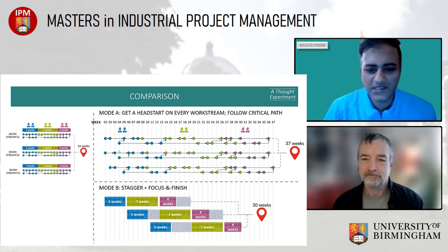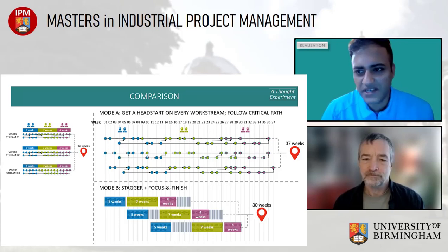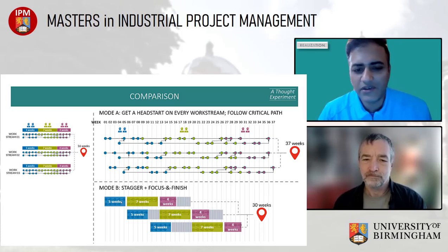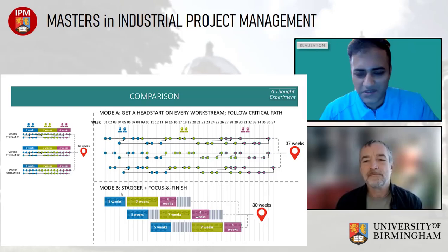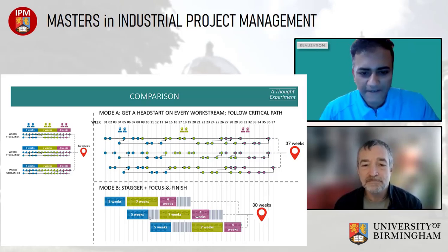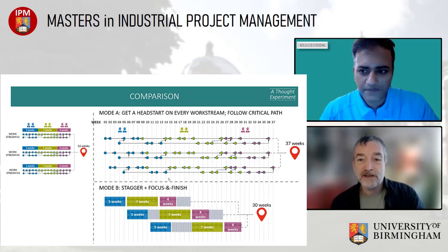Network always remains, unlike the traditional systems where the network goes down to the level of your definition. In this case, the network always remains at the box level. The details keep going inside the boxes. So just advice, I'll jump into the software. Please carry on. And at the top box network level, that's where you have the logical dependencies between the boxes.